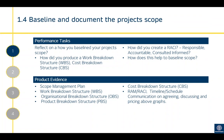Criterion 1.4 is to baseline and document the project scope. Baseline means it is the final planning document during the planning phase. Looking at the project lifecycle — planning phase, then project delivery phase — during planning you put together a plan of how the project is going to be run. At the end of that stage you baseline it, and that becomes the official plan for your project. A baseline plan is signed off as the official plan, though it can still be changed during the delivery phase.